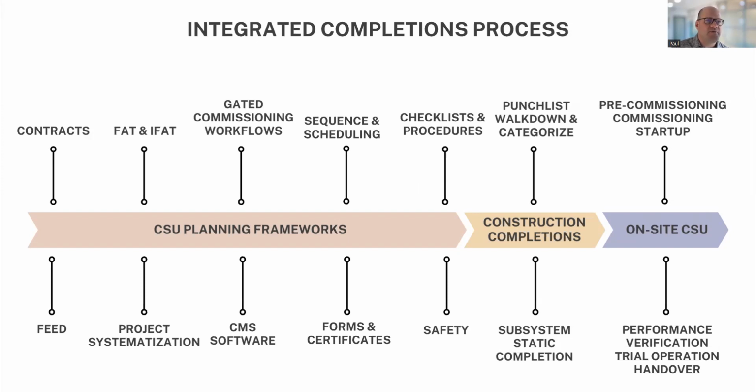The second one is our FEED processes. So you've probably been in projects that have been gathering lessons learned, and a lot of projects are good at gathering lessons learned, but they're pretty terrible at actually implementing lessons learned. And our FEED processes is the process to implement those lessons learned, to have that end of project feedback return to our beginning of project groups during preliminary design reviews, during detailed design reviews.